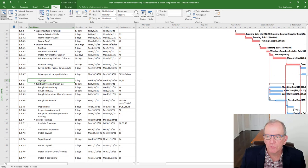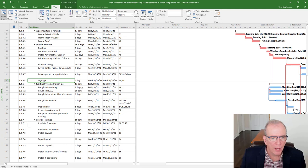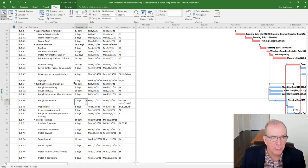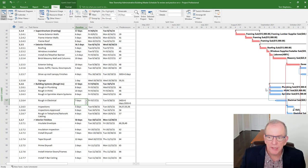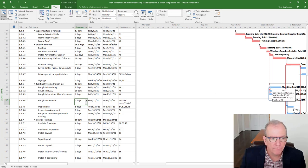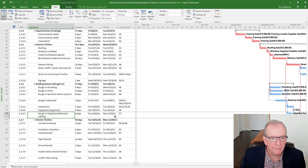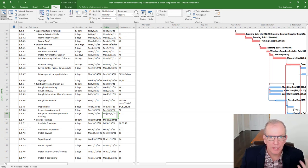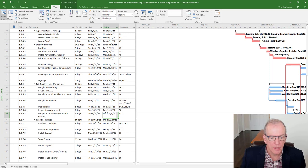It's basically from here to here, how many work days does it take to complete, not necessarily adding these up, but how many in total, because you may have like in this instance, where you've got a bunch of things occurring at the same time. Well, if I add this plus this plus this plus this, you can see it doesn't add up to 17 days, it's going to tell me from the beginning of the first activity rough in plumbing, to the end of the last activity rough in telephone, how long is that going to take in work days, excluding non working days, like Saturdays, Sundays, holidays.